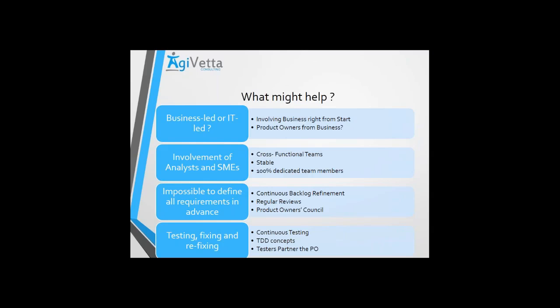Now, as I have been saying in my classes also, start of your project does not necessarily mean start of your sprints. So when you start your projects, you might still need to spend some time working with the business, setting the base groundwork, setting up the base data models where you can get started. And even defining the technology that you want to use. Do you want to go for full-fledged big data solutions? Would you like to have a mix of these, as the case might be?